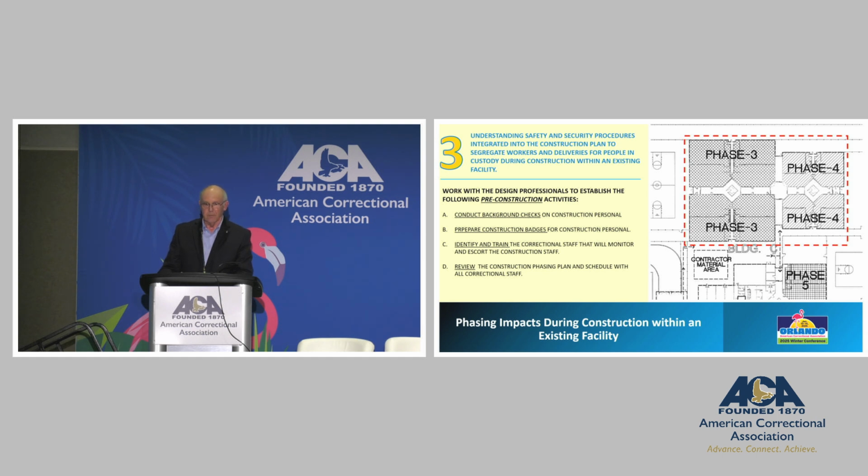Also, typically, we're going to prepare construction badges for the construction workers, so it's very easy for the correctional officers and staff to identify that these workers are actually part of the project and are deemed to be on the site. Another important item is to make sure that you identify and train the correctional staff that will monitor the construction site. And probably the most important part is to review the construction phasing plan with your entire team. This is very important because everybody needs to know exactly what's happening during the construction process and what phase of the construction they're in, so that there's no surprises.